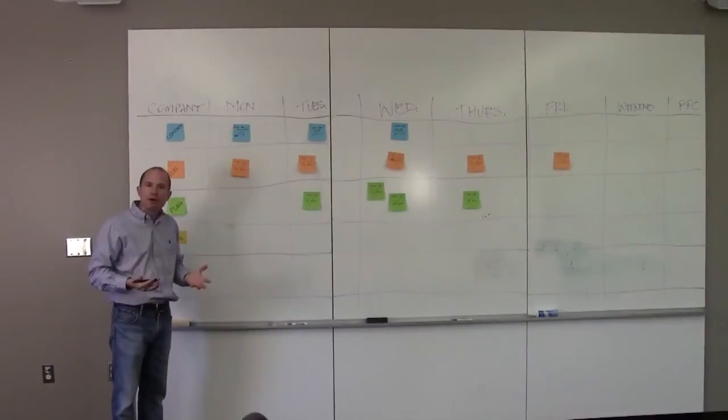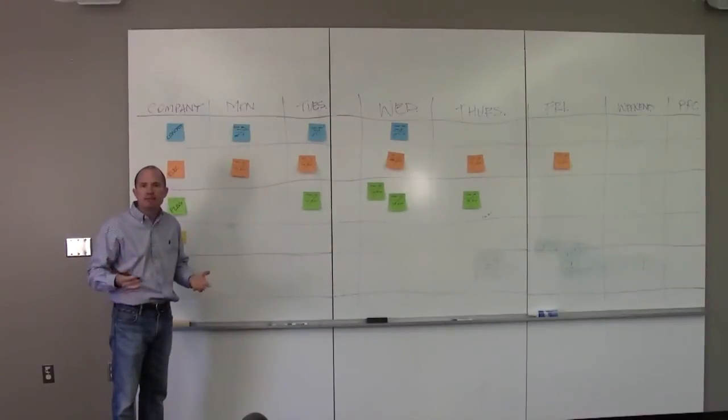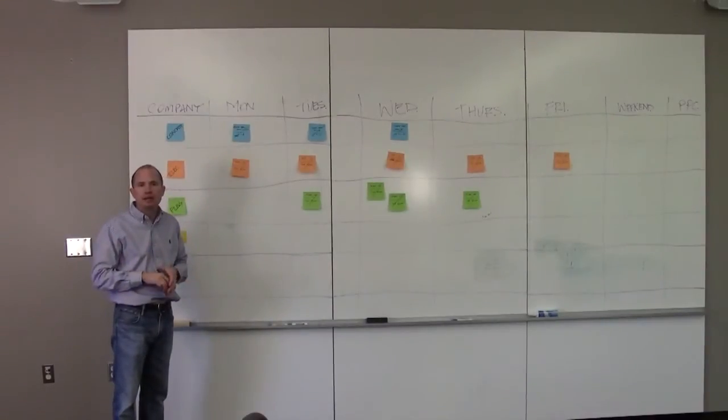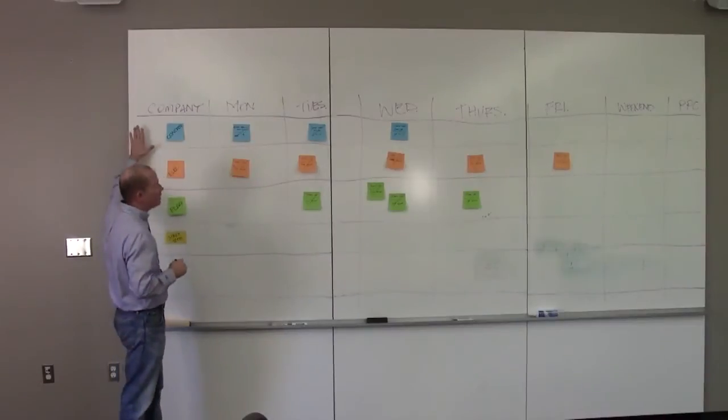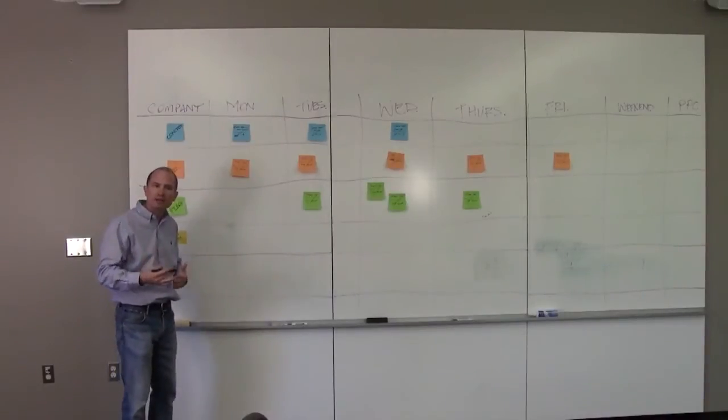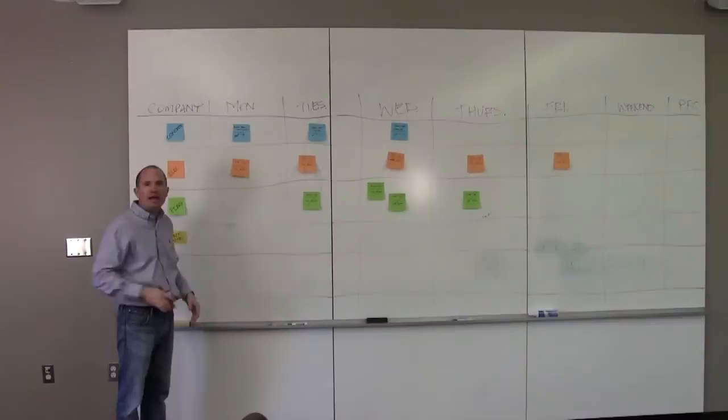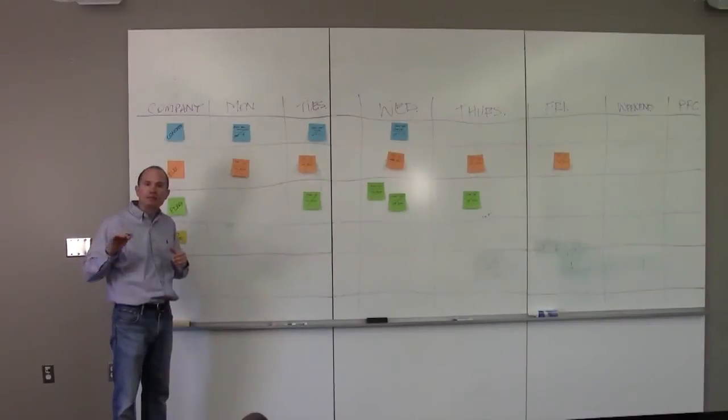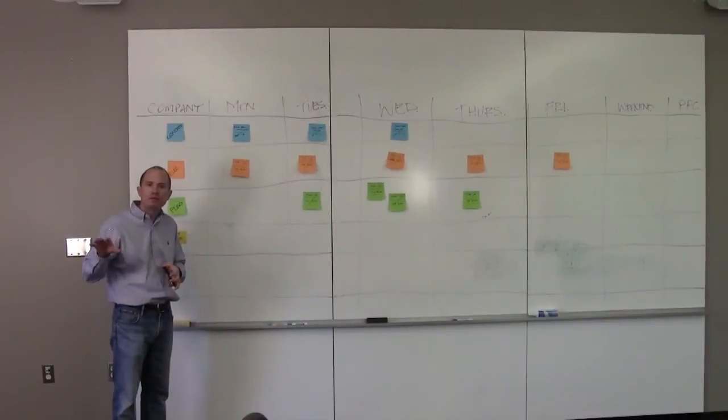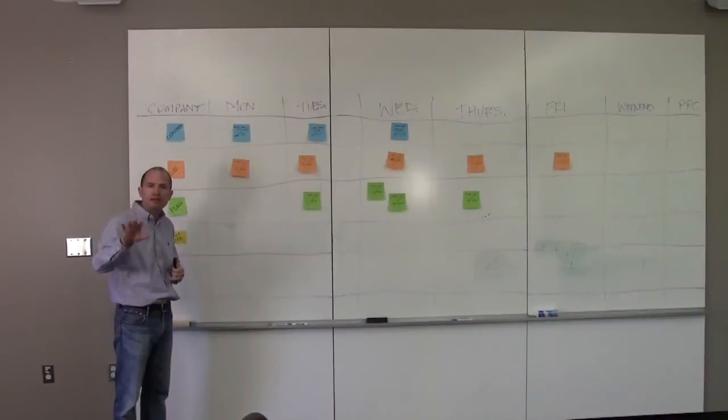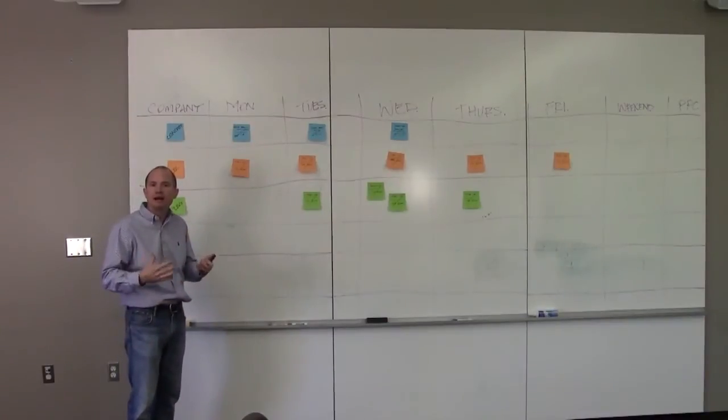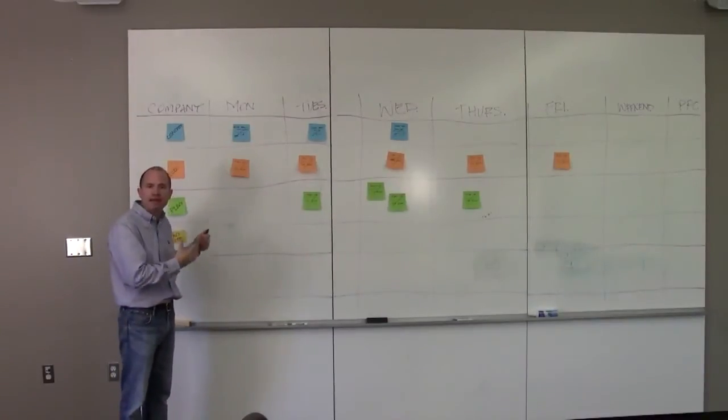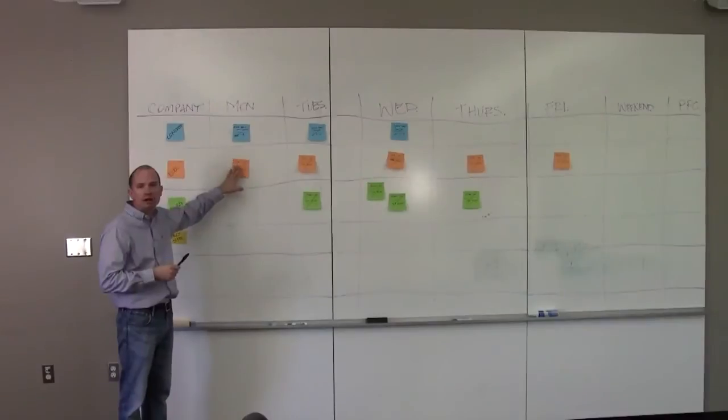But if you have a larger project, say it's a 10-building campus that we're building, then what I would do is if you have a weekly work plan for each building, I would print those off and I would give them to the trades and the foremen and superintendents that are at those buildings and they talk about what they got done in that building that day and they would cross it off.